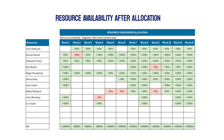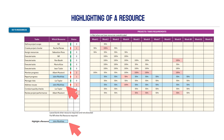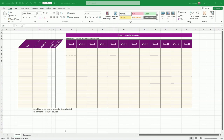You can also view resource availability after a resource has been allocated to a task, and check which resource could potentially replace another, or you could move the task to remove the conflicting allocation. The system also has a way to highlight a specific resource, making it easy to identify where the overall allocation comes from. Finally, we'll create an easy-to-use link to quickly jump from the project view to the resource view.